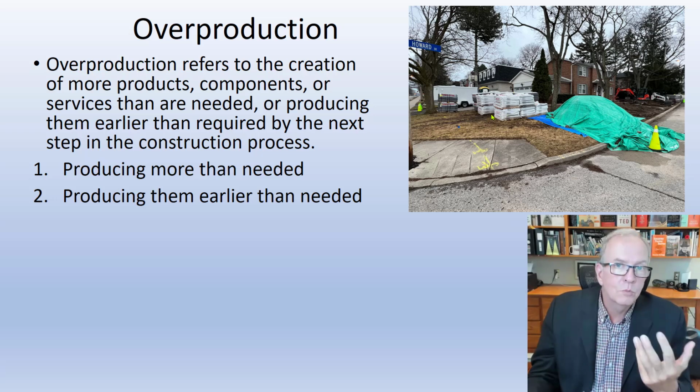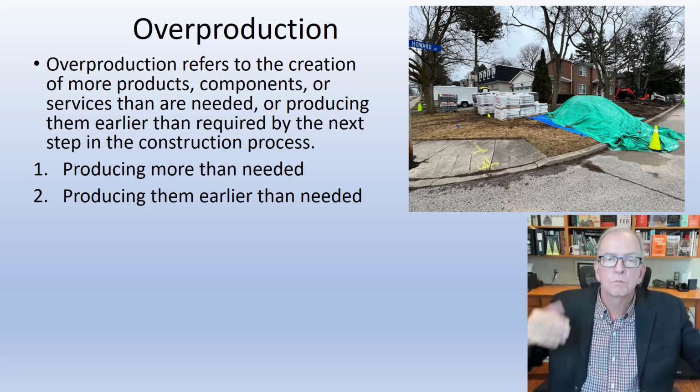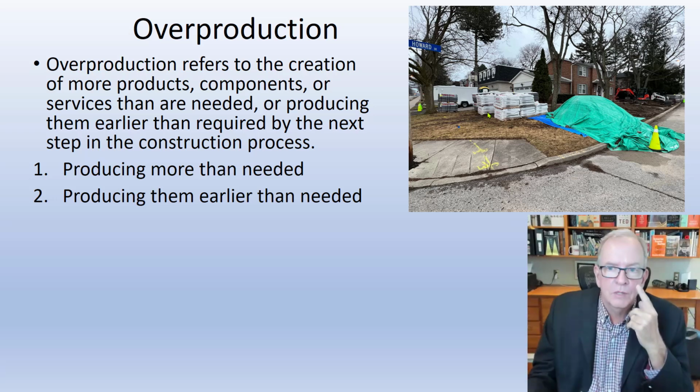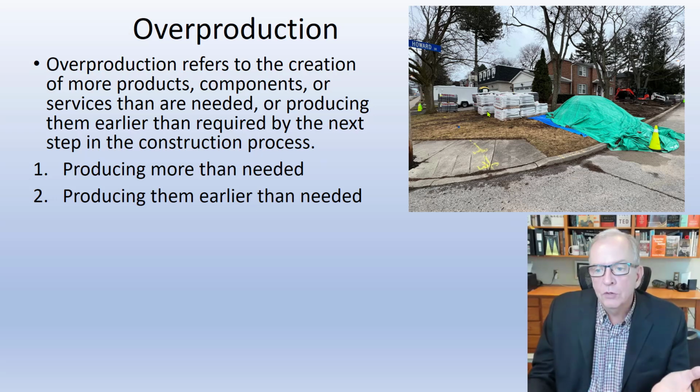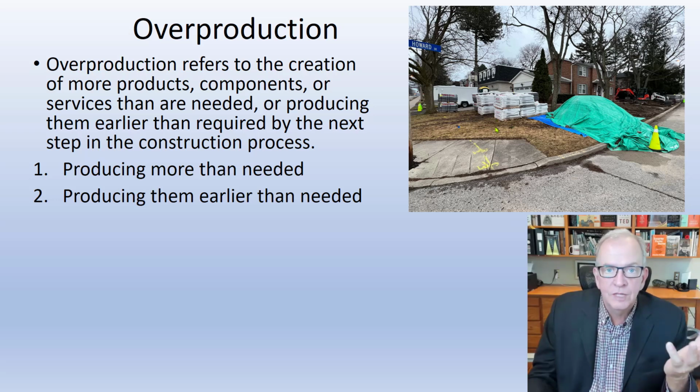If you ordered too much because you just got this bulk order, well, that's going to have some issues with it too. And we'll unpack that a little bit more as we go. And getting it delivered earlier than we need it, well, it means that we're going to have to move it multiple times. Or, you know what, if it's all sitting there, we have lots of theft and different things that go on. It's kind of attractive for somebody with a forklift and a truck to load it up and disappear with it. That's the other thing that could happen.